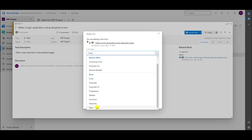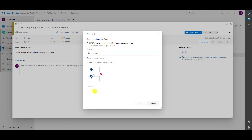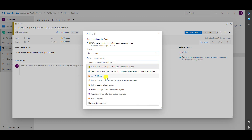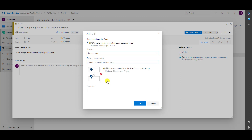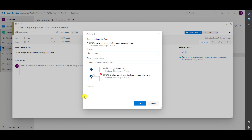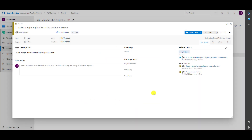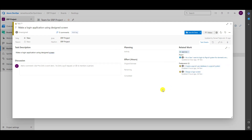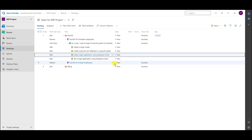I will say that this task 'Make a Login Application' has predecessors. The predecessors are: 'Create a Payroll User Database in a Payroll System' and 'Design a Login Screen.' If I click OK, I will see that those two tasks are predecessors — first, create a payroll user database should be done, and then design a login screen should be done. Let's save and close.